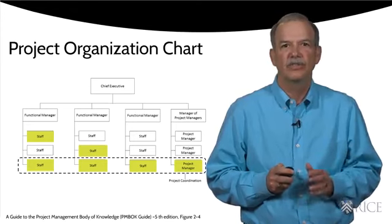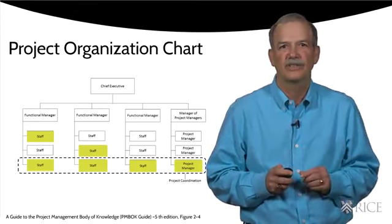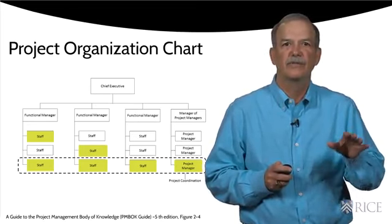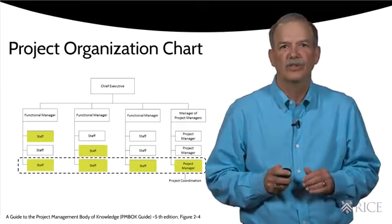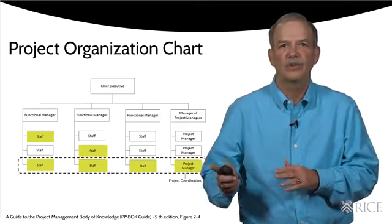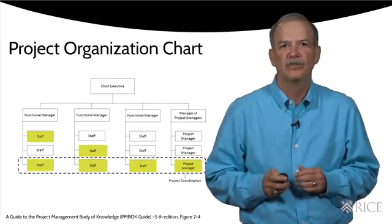Many times the organization charts mirror the hosting organization's functional organization. This is done to allow the functional organization to matrix into the project, or in the case of a matrix organization, to allow the project to coordinate with one function for each key position on the organization chart.